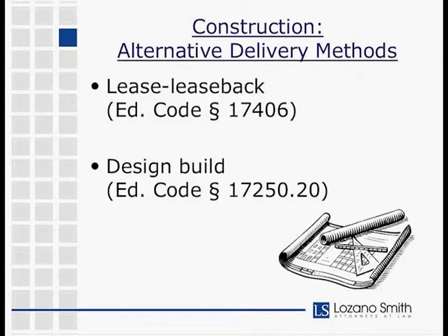Okay, so just to recap briefly to make sure there's no confusion, I've covered three different thresholds for bidding that may apply in different circumstances. The first was the $84,100 that applies to our equipment, materials, and supplies, services, and maintenance. And then in the construction context, there are two separate bid threshold schemes that may apply. For non-Cupcake districts, it's $15,000, and for Cupcake districts, it's the $45,000, $175,000 informal versus formal bidding.